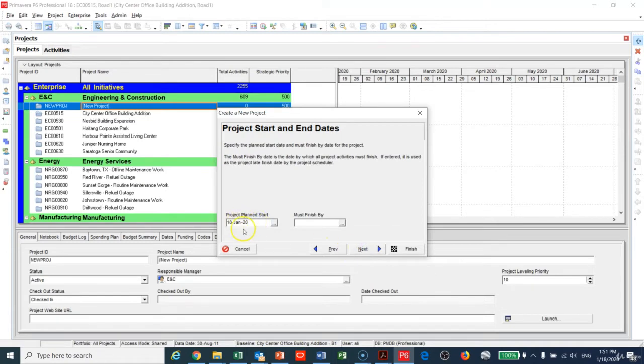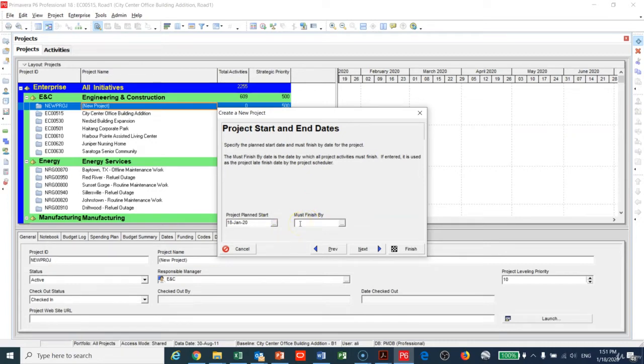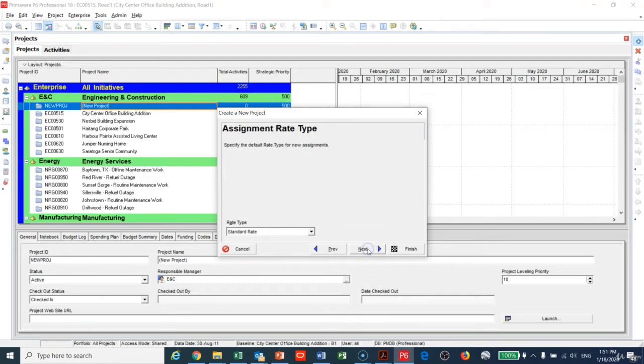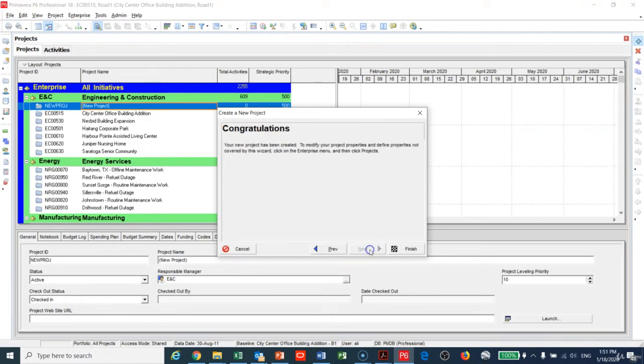Next I will keep the planned start date as it is. We should not touch the Must Finish By field because it affects the critical path—we'll have separate lectures about Must Finish By. I will keep the responsible manager as it is and then make Finish.